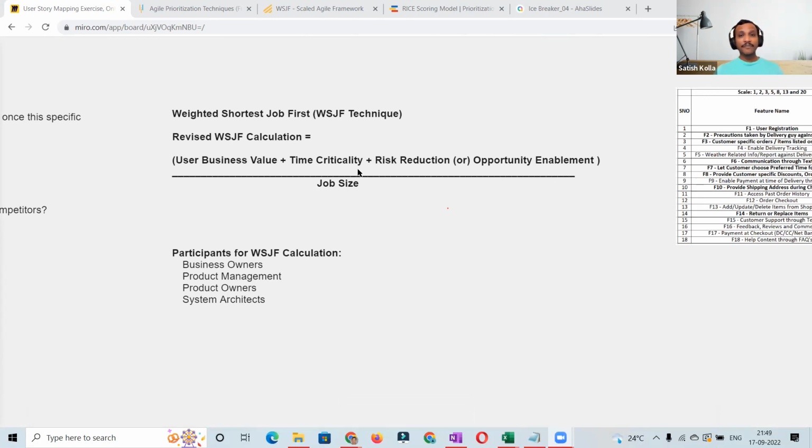Hey, if we have to do it ourselves, we might be able to get it done in 10K, but we might need 6 months of time. Because of the hard stop of 3 months, we might have to go for a third-party API or a tool, which might cost us 25K. Are you okay to sponsor that? Are you okay to take that from your budget? Right. So that is the discussion which could be happening along with the prioritization.